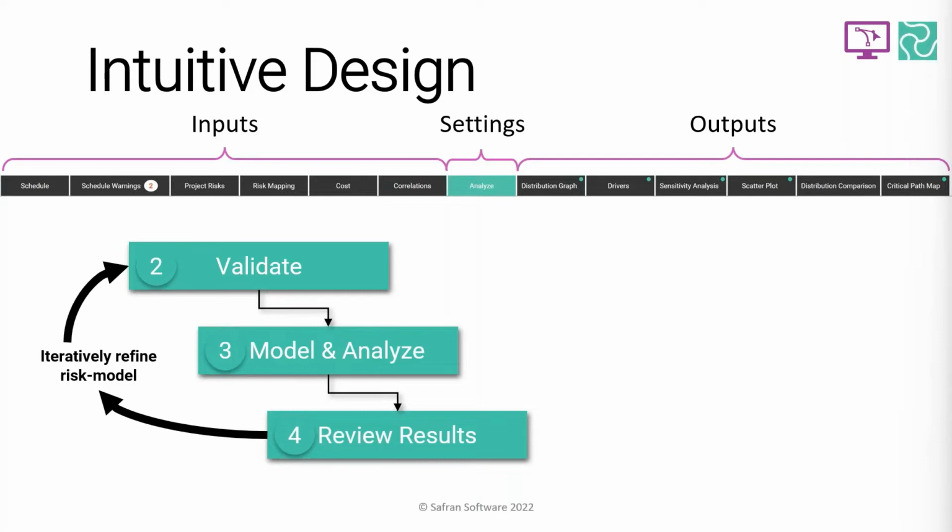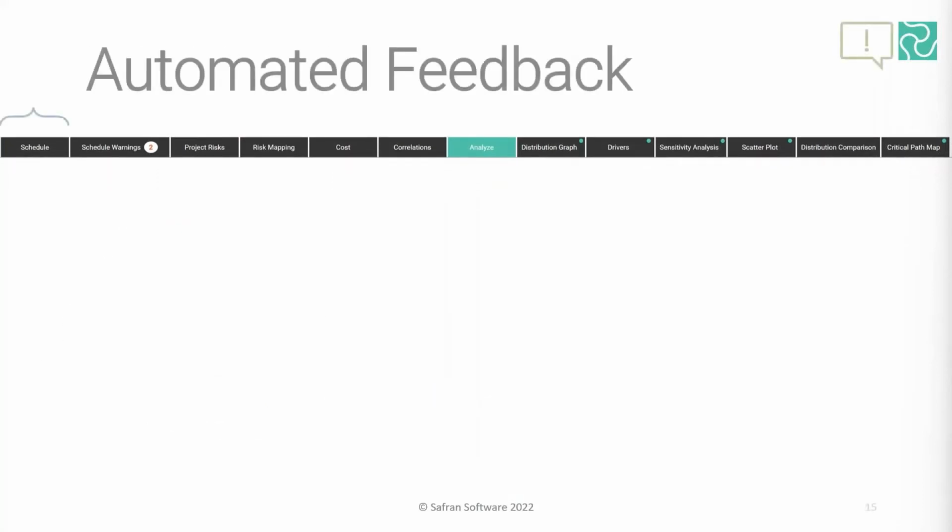So what this means is that you'll start to go around the loop here of steps 2, 3, and 4 of the iteration cycle far fewer times because your collaborators are spotting the anomalies and the issues of the inputs before you commit to running the main Monte Carlo simulation. So you're wasting less time. And for this reason, I'd also encourage you to include typically adversarial parties in the co-creation of your risk model, as this can potentially save you lots of time in spurious challenges being fielded just before you're about to submit your final report, because they were involved in the process, so they had their chance. So you should find that's a benefit too.